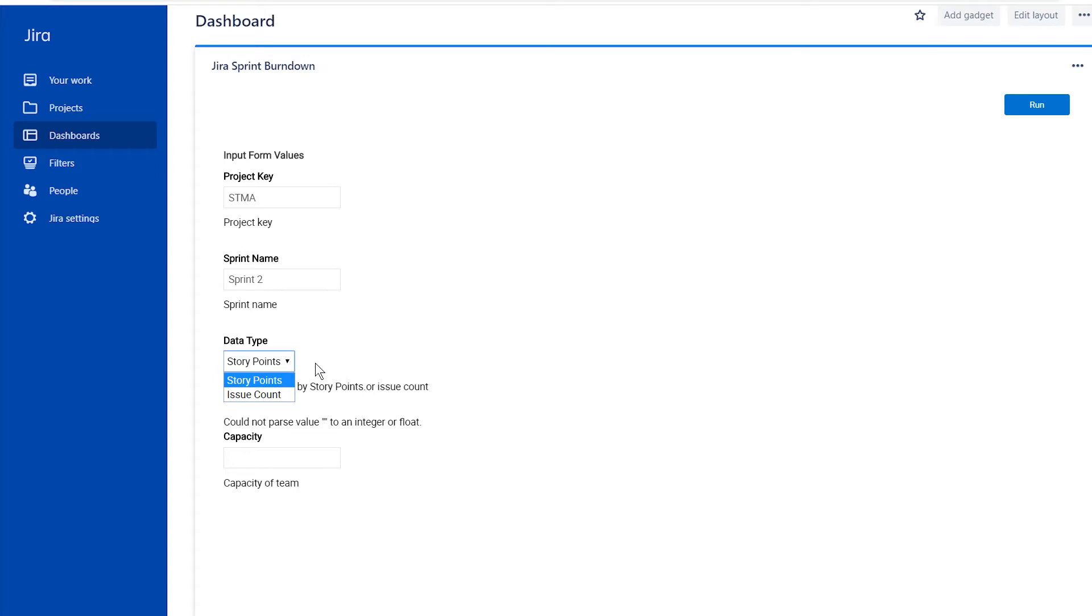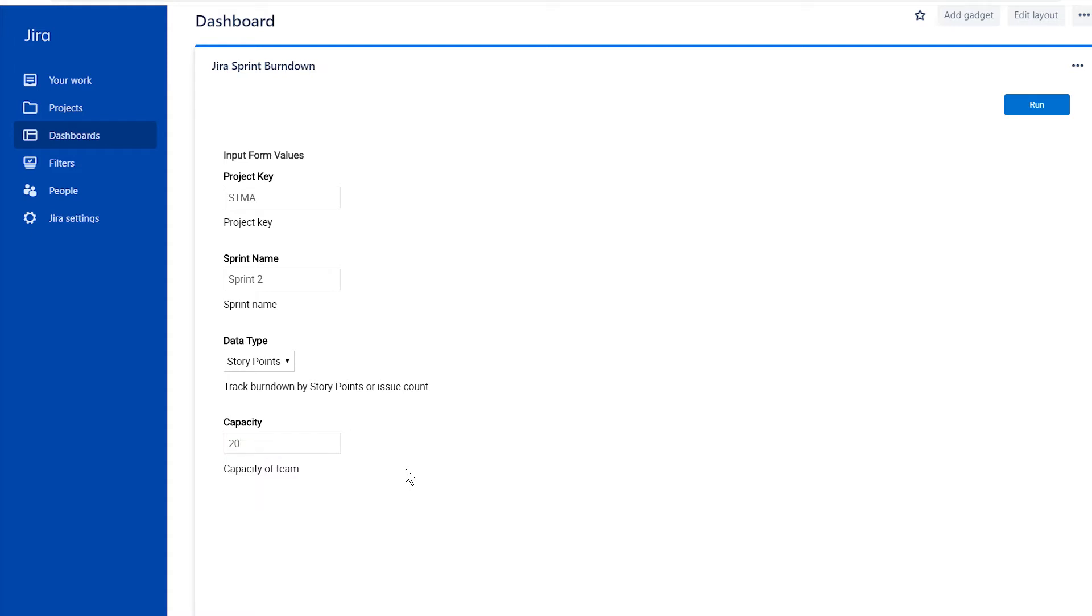You'll also need to enter your team's story point capacity. If you choose to track story points, make sure all issues in your selected sprint have story points assigned to them.